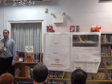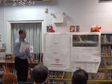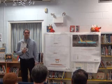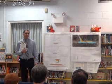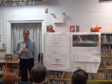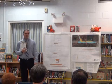Yeah, I mean, we can put plates up if we have to, but they're probably going to try to expedite that as much as possible. So we have to make provisions for it, because that's the major route to Southern Maine Medical Center, and all the ambulances from that side of the county come down that way, so we've got to have at least one lane open at all times. Yes, absolutely.